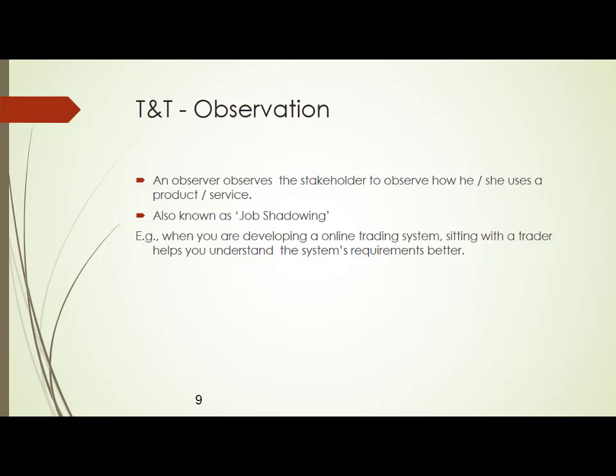So the same example I have given you here. When you are developing an online trading system, sitting with a trader helps you understand the system's requirement better. You sit with him in order to understand the requirements better rather than giving him questions and asking him to write answers to the questions. Job shadowing will give you more clarity in understanding the requirements. This also is one of the tools and techniques to collect requirements from the stakeholder.